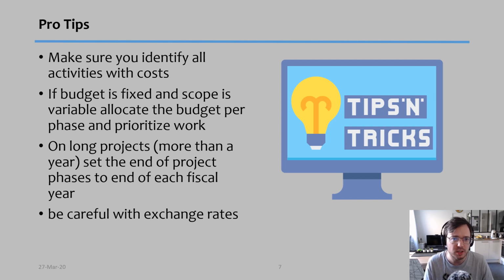If you have long projects, my suggestion is to put the end of one of the tasks to coincide with the end of the fiscal year, because a lot of times this can make it much easier to obtain the necessary budgets you want. And finally, if you're working with many different countries on your project, be careful with exchange rates.